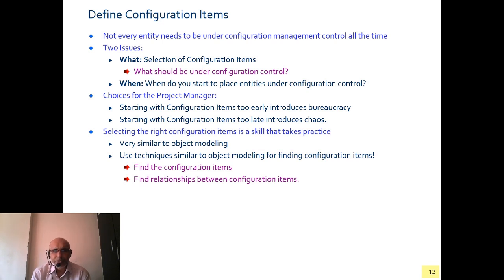Not every time; your day may not begin with working around with configuration control. So the choices are that starting the configuration item too early introduces bureaucracy, while starting with configuration items too late introduces chaos. That is a complete out-of-scope kind of work you are trying to handle.